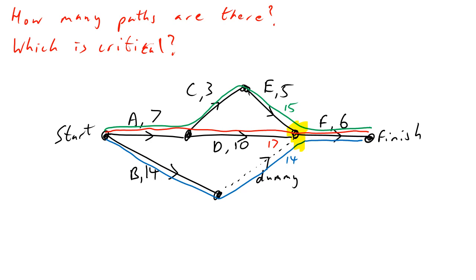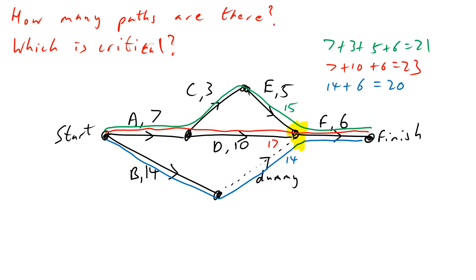Which path takes the longest to complete? The A–D path takes the longest. Once all three are done you can then do F and finish. Looking at the total values: the green path is 7+3+5+6 = 21; the red path is 7+10+6 = 23; the blue path is 14+6 = 20 (ignoring the dummy, which has a value of zero). The critical path is the red path at 23 — you have to wait at that node for D to finish before you can start F.